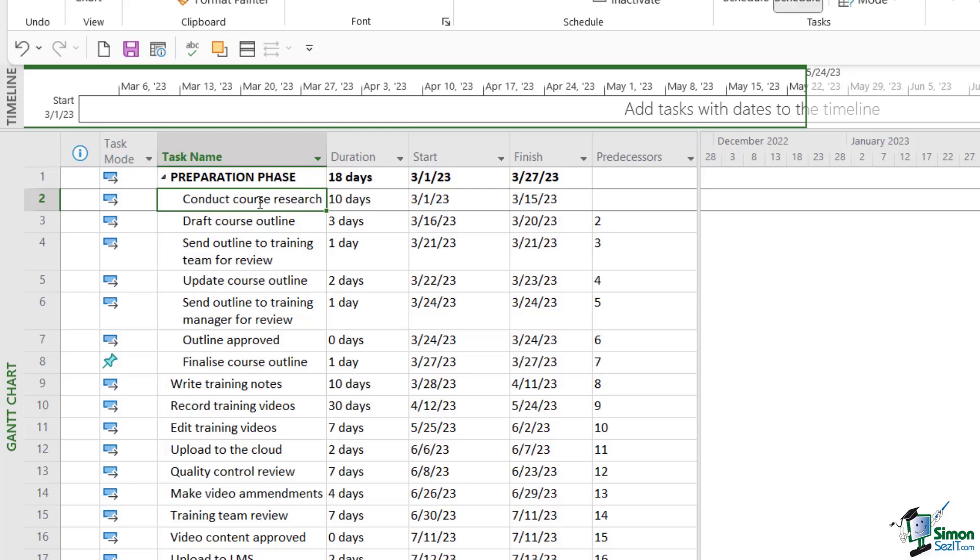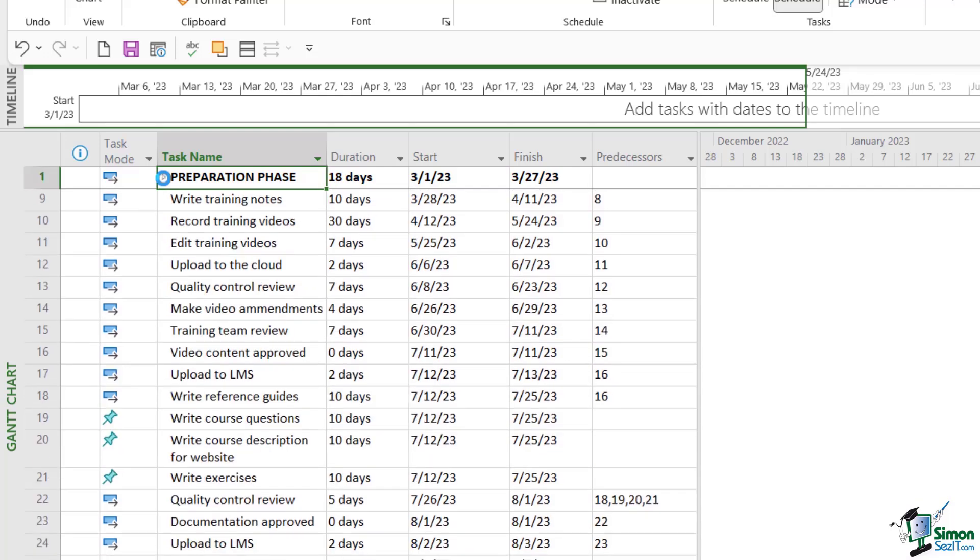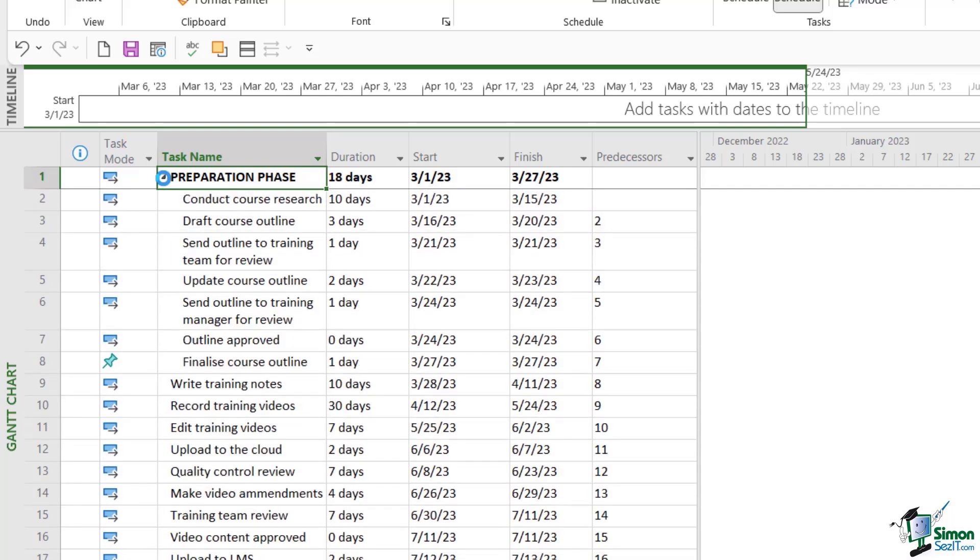You don't have to put it in caps. That's just how I've chosen to lay these summary tasks out. Now notice that as soon as I do that, I get this little black triangle next to the summary task. So this is a collapsible and expandable group. Now I can click on the little arrow and it's going to collapse up all of the subtasks. Click again and it's going to expand them all out.